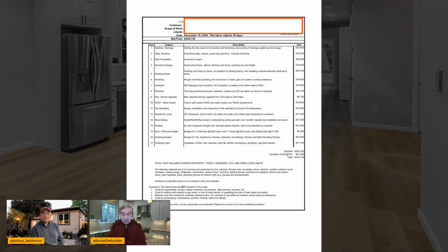Absolutely. So this ADU that we built for $440,000, I think it was completed in 2021. This was a 1,200 square foot ADU. So if you look at the dollar per square foot number, it turns out to be about $366 a square foot. In that city, the finished products were selling for almost $1,100 or $1,200 a square foot.